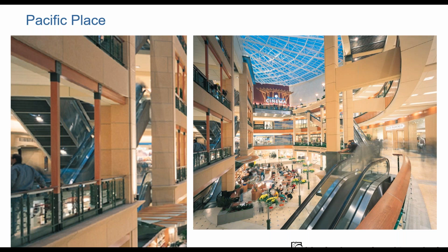We had put together a pretty involved sequence of operations, how this was supposed to work, and we'd zoned everything on the plans. But ultimately there were lots of problems with not only the initial installation, but once we finally got everything programmed correctly, every single time there was an update to the HVAC system program, it would screw up the lighting program so that things were not working properly.